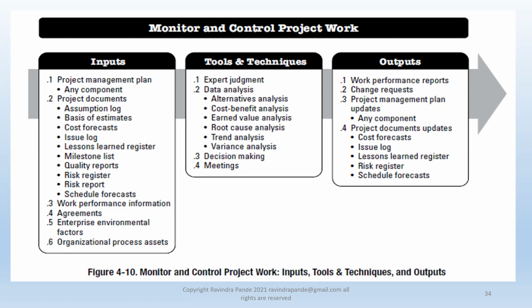Then project document updates. We do update the cost forecast. If you keep executing the project at the current pace, what type of cost and what type of schedule are we looking at? Any changes thereof are to be noted and updated in your project management software. Then there are issue logs. Any additional issues, any risk materializing, are to be analyzed on an almost daily basis by the project manager and a few team members. We don't normally involve everybody from the team in day-to-day risk reviews.